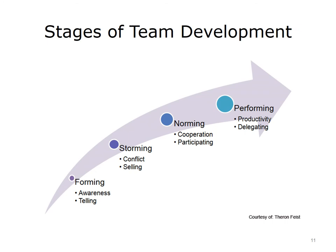Forming, storming, norming, and performing is a model of group development first proposed by Bruce Tuckman in 1965. He maintained that these phases are all necessary and inevitable for a team to grow, tackle challenges, address problems, find solutions, plan work, and deliver results. Teams typically progress through these stages. During the forming stage, behavior is largely driven by a desire for acceptance, conflict is avoided, routines and organization are the focus, and individuals are becoming aware of each other. The project manager focuses on telling team members what to do and how to do it.